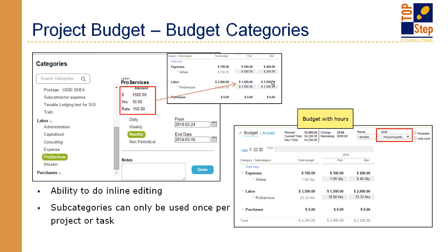Very simple. However, if it's T&M, it's a little more complicated because you almost have to calculate your budget by month outside of the system, since it only lets you have one line item. Most T&M projects have different hours at different rates that build up your entire budget.